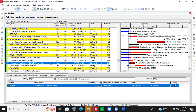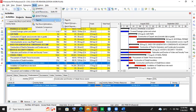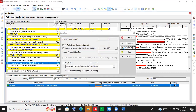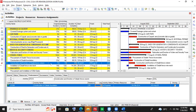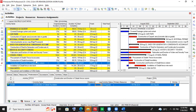So you go back — the predecessor started on the 19th of February 2022, and this is July, and it's telling me it's out of sequence. So remove those 35 days, change it to zero, and go back to your tools to check if it's still out of sequence. It's still there. Meaning that if you want to start a progressed activity, you will need to change the logic — change the relationship. This activity's predecessor is no more construction of the foundation; you remove it.